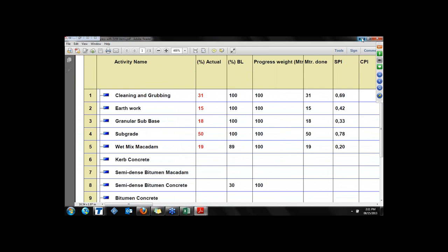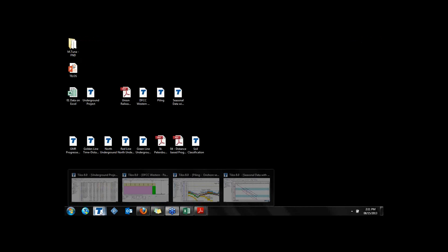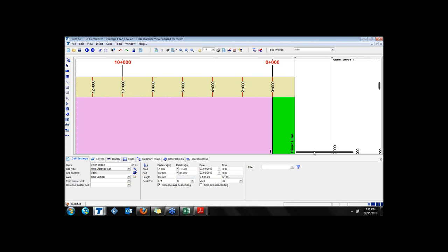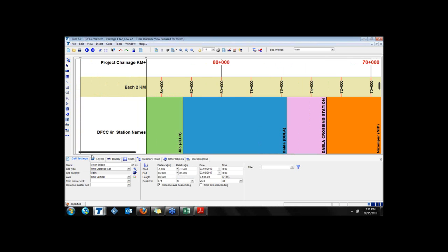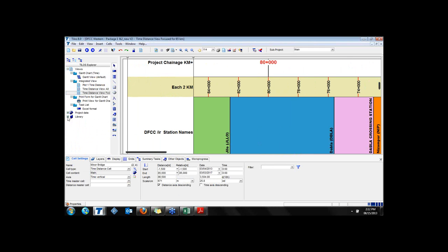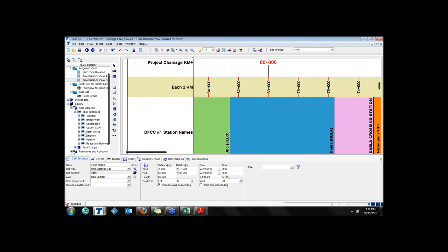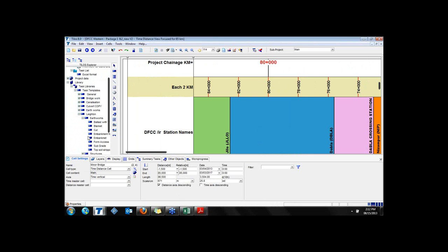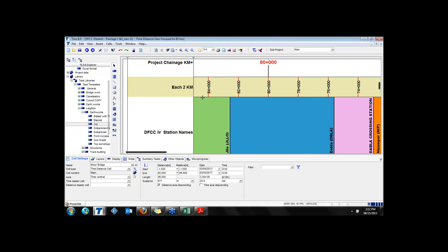And after you close your project, you can keep your project as a template in TILOS. So for your next project preparation, it will reduce your time, because it allows you to have a library which is your knowledge base. And these templates, such as this structure for earthworks, you can use in your next projects, or you can exchange your libraries with different TILOS projects.